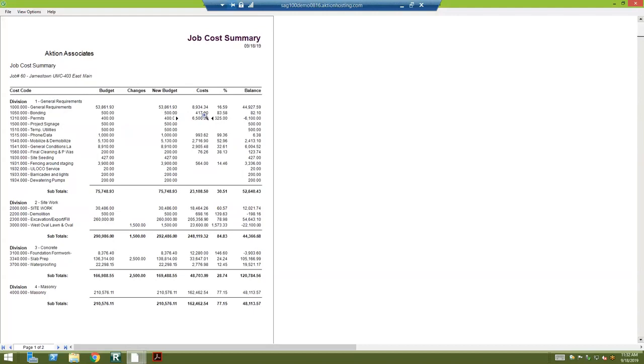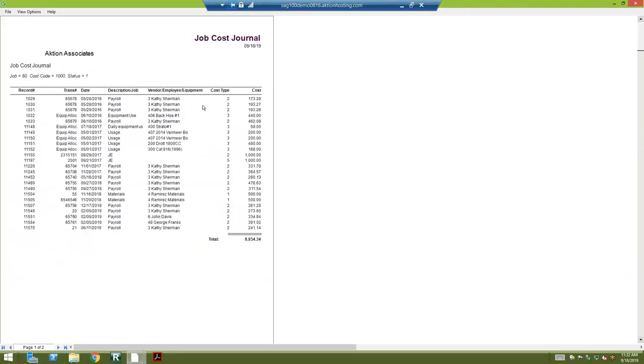When labor is charged, it can also be entered into the job and the cost code. That's how the labor is going to get to a particular line item.